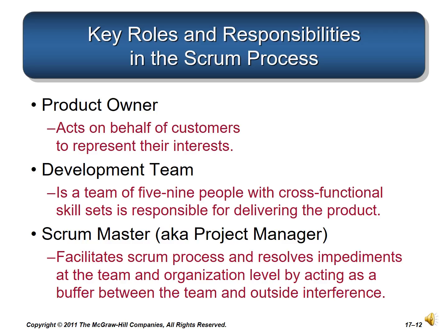The product owner has the option to change features and priorities at the end of each sprint if he or she so desires. However, no changes should be made once the sprint has started. The product owner is the final arbiter on requirements and questions, and is empowered to accept or reject each product increment. The product owner ultimately decides whether the project is completed. Product owners are the keeper of the product vision and the watchdog on the return on investment.